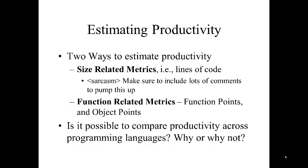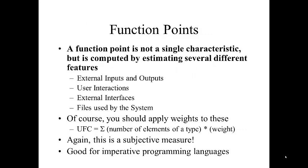The second way is to look at function-related metrics — these are function points and object points. A function point is not a single characteristic, but is computed by estimating several different features: external inputs and outputs, user interactions, external interfaces, and files used by the system. You apply weights to each type. The unadjusted function point count (UFC) equals the sum of the number of different types of each element multiplied by their weight. Simmons suggests that function point count depends upon who is giving the estimate, so this is a subjective measure.